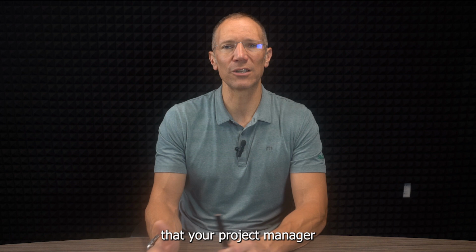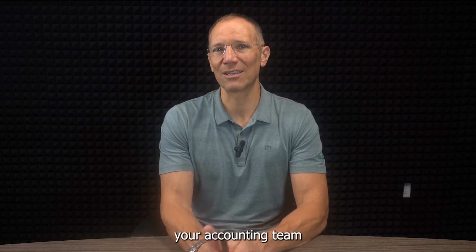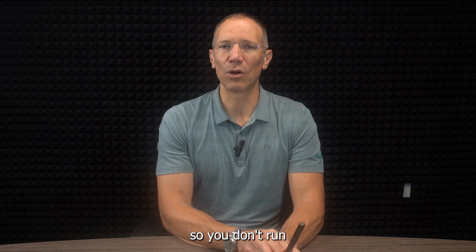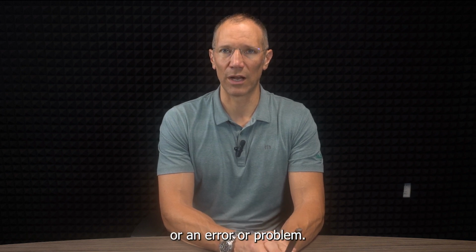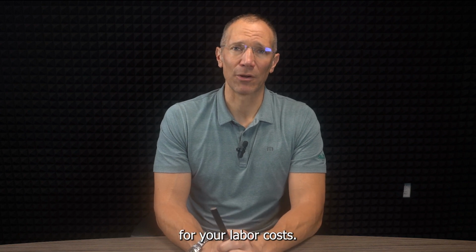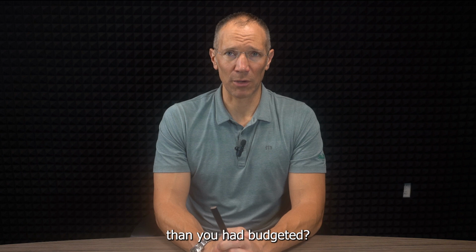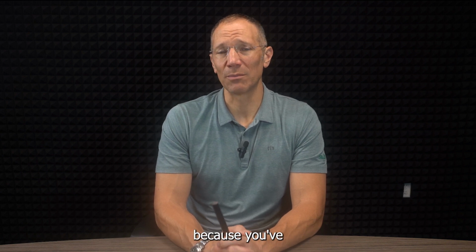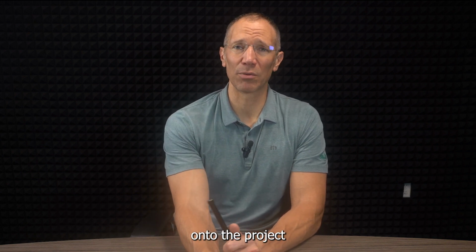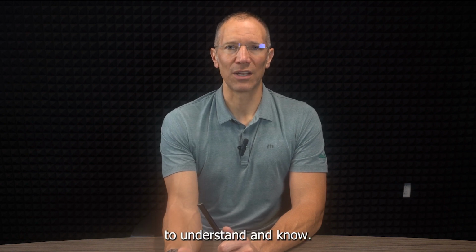Those are things that your project manager is going to be able to give feedback on, but also you want to make sure your accounting team is updating the budget so you don't run into a cash flow situation or an error or problem. Your project manager is also going to let you know where you're at for your labor costs. Are you actually getting more work done with the labor that you budgeted? Are you getting more work done because you've put more labor onto the project early on? Those are things that you're going to want your accounting team to understand and know.